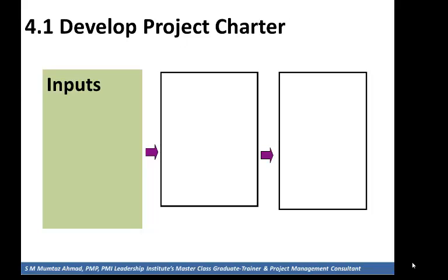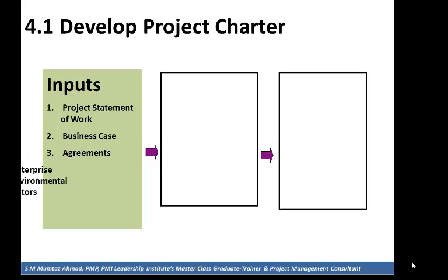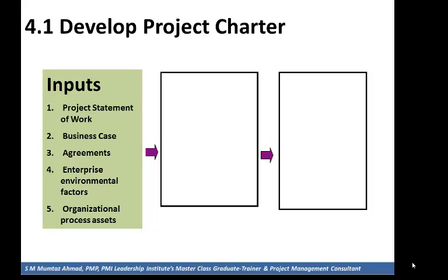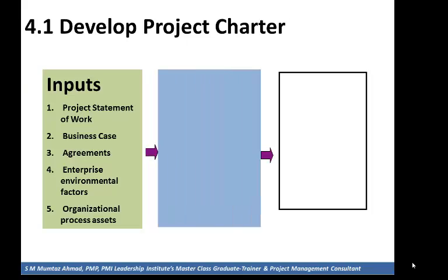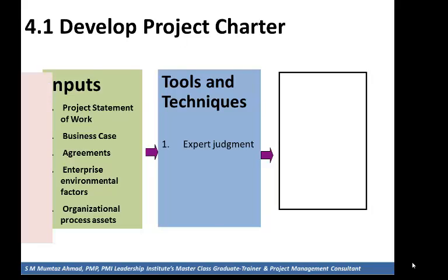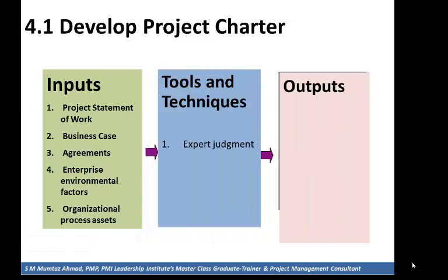Inputs: 1. Project statement of work. 2. Business case. 3. Agreements. 4. Enterprise environmental factors. 5. Organizational process assets. Tools and techniques: Expert judgment. Outputs: Project charter.